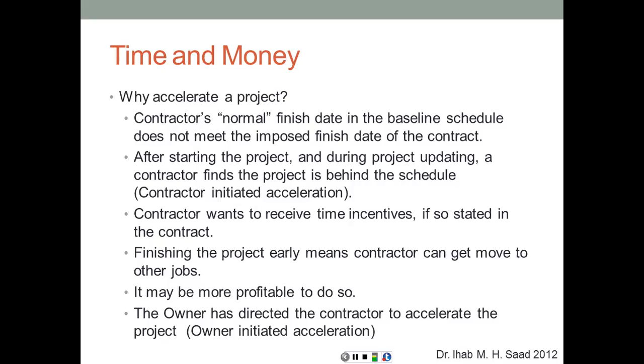That's for the contractor. If, for example, we anticipate some material or equipment price increase in the future and we want to finish early so as to avoid this price increase, that would be another avenue. The owner has directed the contractor to accelerate the project. In this case, it's going to be considered an owner-initiated acceleration, and usually the contractor would get some reimbursement for any extra costs that might be incurred due to that owner-initiated acceleration.